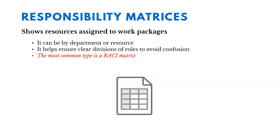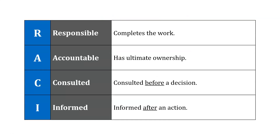A responsibility matrix shows resources assigned to work packages — who's going to do what. It can be by department or resource, and it helps ensure clear divisions of roles to avoid confusion. It's also known as a responsibility assignment matrix, or RAM. The most common type is a RACI matrix, which stands for responsible, accountable, consulted, and informed.